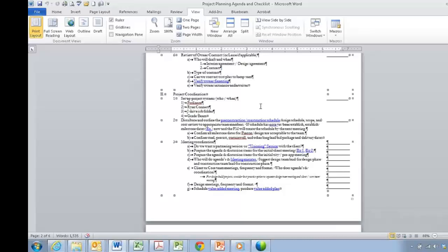It's a great time here, too, to insert the schedule. Now, I will say I appreciate how we say here the pre-construction or construction schedule. Whether you call it the development schedule, a time plan, that schedule that documents the whole process when you think about it from a design-build perspective. That encompasses design, city, and construction process, client interactions, budget approvals. The overall general time plan is what we're really trying to get at there. It can be the very detailed construction schedule if it's available at the appropriate time, but really here again, it's about that roadmap from the inception of the deal to the final completion.